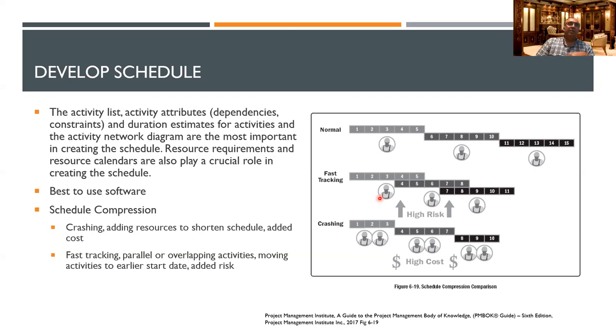So this is why it's important. Every week, you're going to look at your scope baseline. What are the activities we have to do? What are the work packages we have to do? How much have we completed? What is left over? What is critical? You have to do that regularly every week. Then you can see if you need to hire somebody temporary or you need to move some activities parallel, and you can do that accordingly. So is that clear?